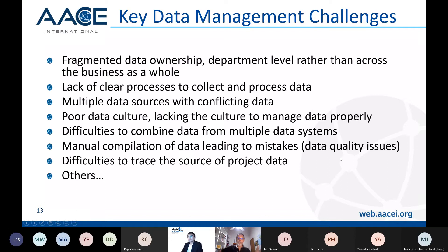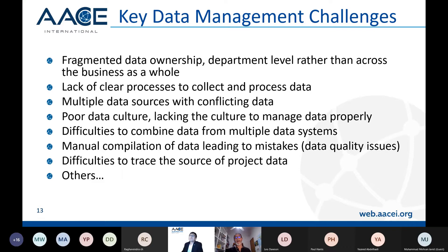Not everything is perfect — there are a lot of challenges with implementing data management in organizations. One of the biggest is fragmented data ownership: the cost information is owned by the cost department, schedules by the planning department, procurement information by the procurement department. Information is owned at the department level rather than across the business as a whole. It's really about breaking down the silos to connect information across different departments.